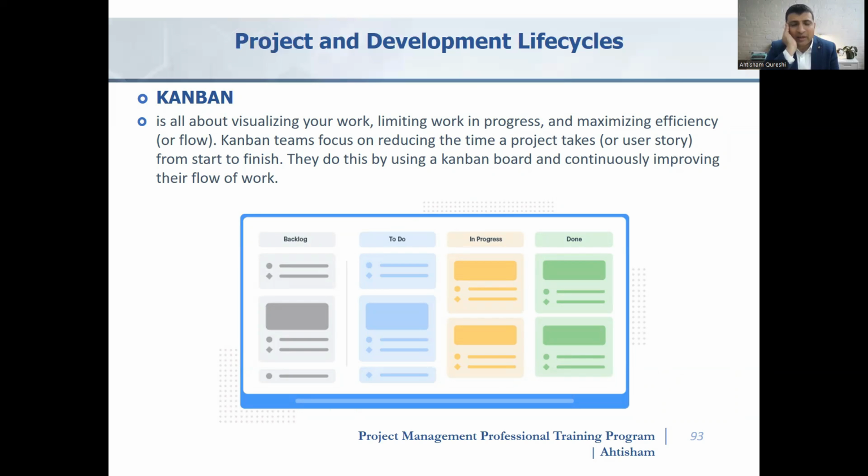Kanban is to visualize the work in progress in a manufacturing unit. Okay, so there will be many items that need to be worked on, which are piled up. We call it a backlog. And there will be items which are being worked on. For example, you plan to do them. These are on your table. Okay, I took these tasks. Some tasks are still on my manager's table, but some tasks are on my table. I have to complete them. And then if I started working on them, these are in progress, and some are already completed.